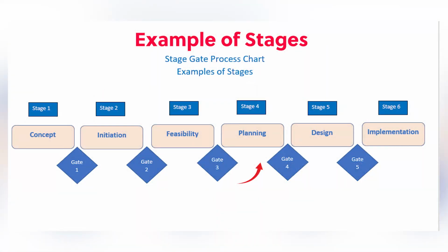And then we go the same again. During the design stage, you'd produce your draft designs and your detailed designs. So then your input would be your design documents and design drawings to be approved. When these are approved, then the funding is released to implement the project or deliver the project.